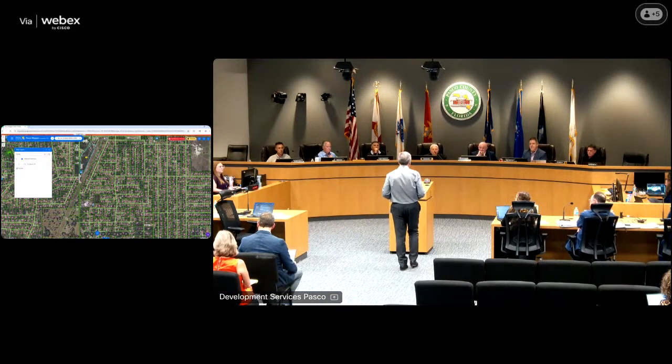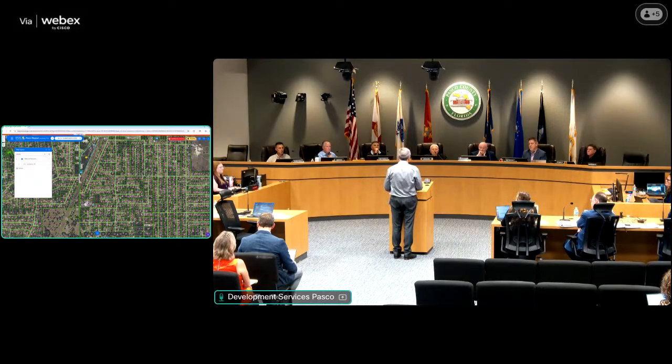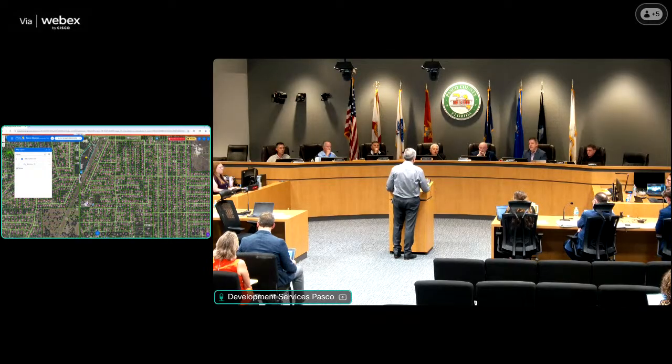Good afternoon, Panos Conces, Assistant County Engineer, working for the Transportation Engineering Department. Mr. Engel correctly said that we got a direction from the board to move up the priority for the widening of Shady Hills. However, we are waiting for the new budget to take effect, to amend the budget and introduce the route study. First, we have to do the route study to assess where the widening is going to happen, on the east side, the west side, or center. So we'll have to look at different alternatives.